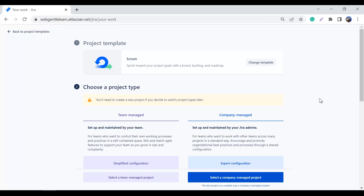You have to choose the project type very carefully because it is very hard to transition between team managed and company managed projects. Going from company to team or team to company is very complex and creates a lot of mess. So if you want to save your Jira instance from that mess, please choose the right project type.